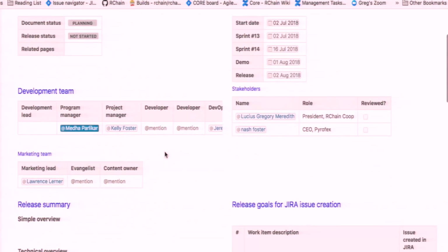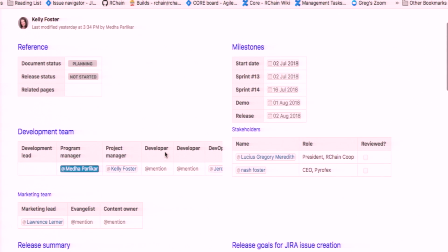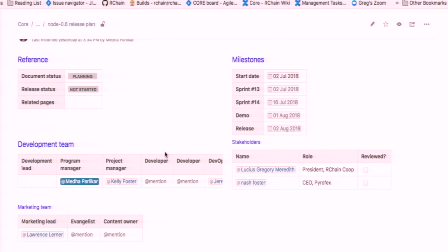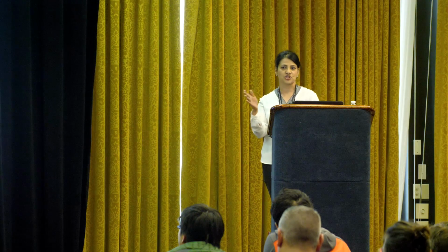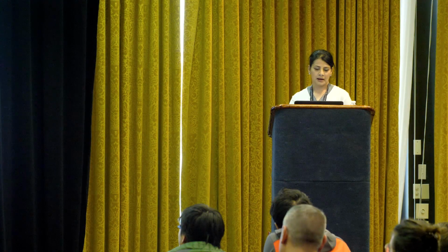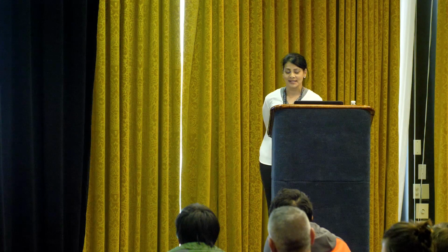How much have I fleshed out Node 6? A little bit. So talk about Node 6. Node 6, the release date is, now understand guys, it's getting a little squishy here, right? So we're talking August. So the scope, as we get further out, we have the cone of uncertainty, so as we get further away from today, it becomes less and less clear as to what's going to be in the releases as things are going to shift back and forth. But I have confidence that we'll be releasing something on August 2nd.